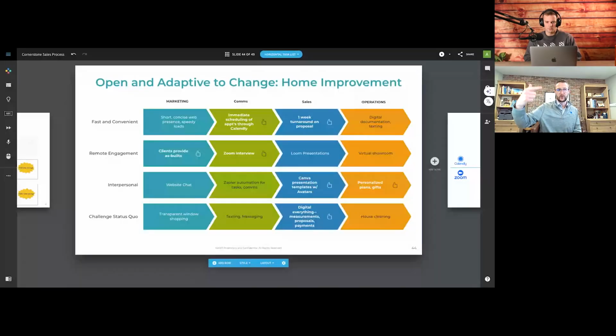Same with pricing. They're getting these updates on their allowances, how much they've gone over or spent under, and they're tracking that inside of our construction management software. So they know at all times where they are, where the price is coming in. So that last, hey, here's your final design and here's your final no surprises estimate, it doesn't come as a surprise to them what that final number is. It's been building that entire time. And at that point, we're just locking it in.